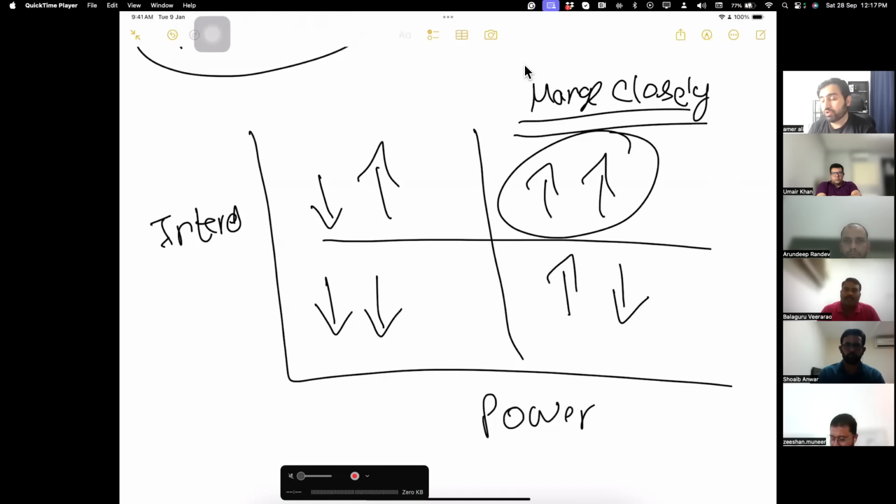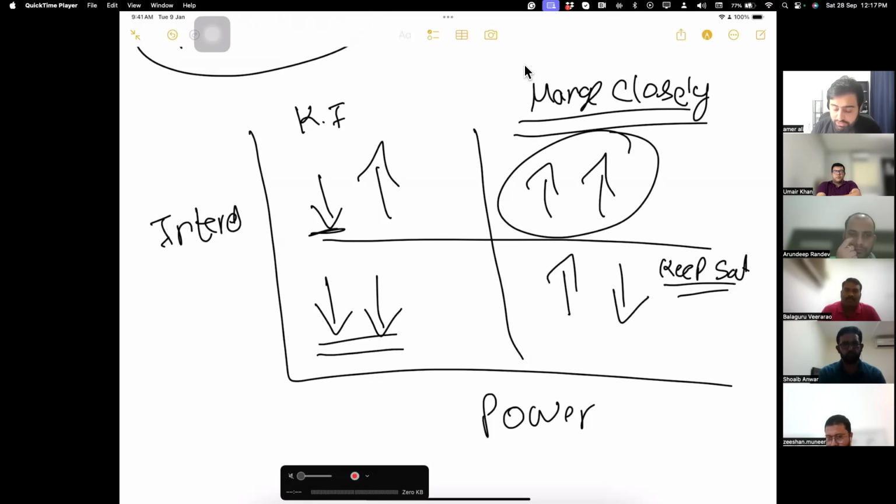But those stakeholders who have high power but are not interested, you still keep them satisfied. If they are not satisfied, they are people with high power, they can destroy you. Those who have less power but are highly interested, keep them informed, because giving them the information will make them focus on the task. Those with low power and low interest, put them into a watch list and monitor them once a quarter, once a month, however your frequency is, but you need to monitor them.